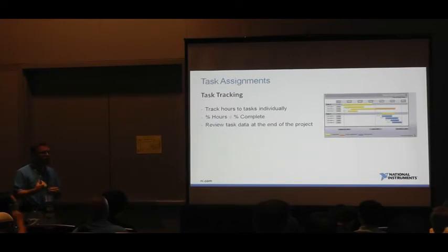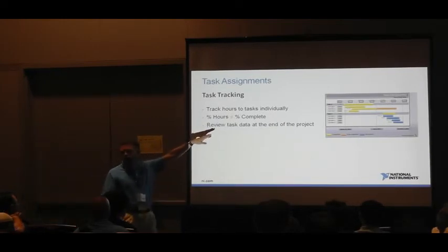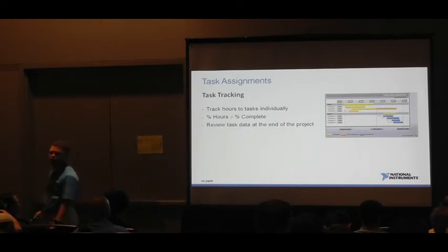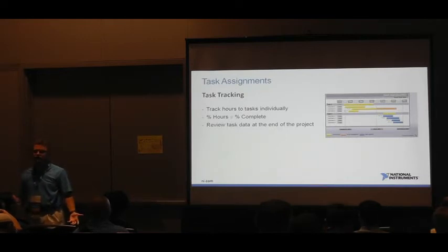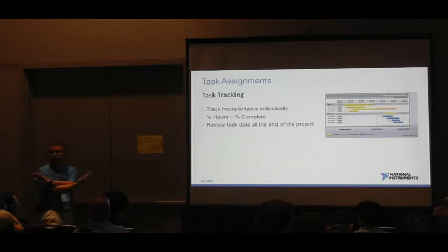Now, keep in mind that percent of hours does not equal percent complete. How many of you have gotten to where you've gobbled up 90% of your hours and you're only halfway done? Yeah. Me? Yeah. Now, it can go the other way too, and that's when you really hope you did firm fixed price.